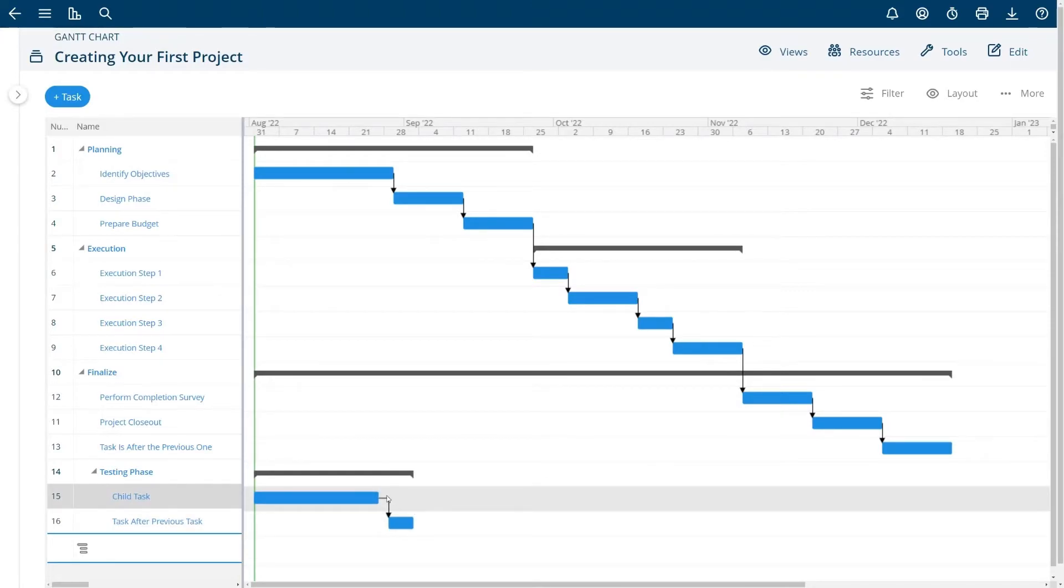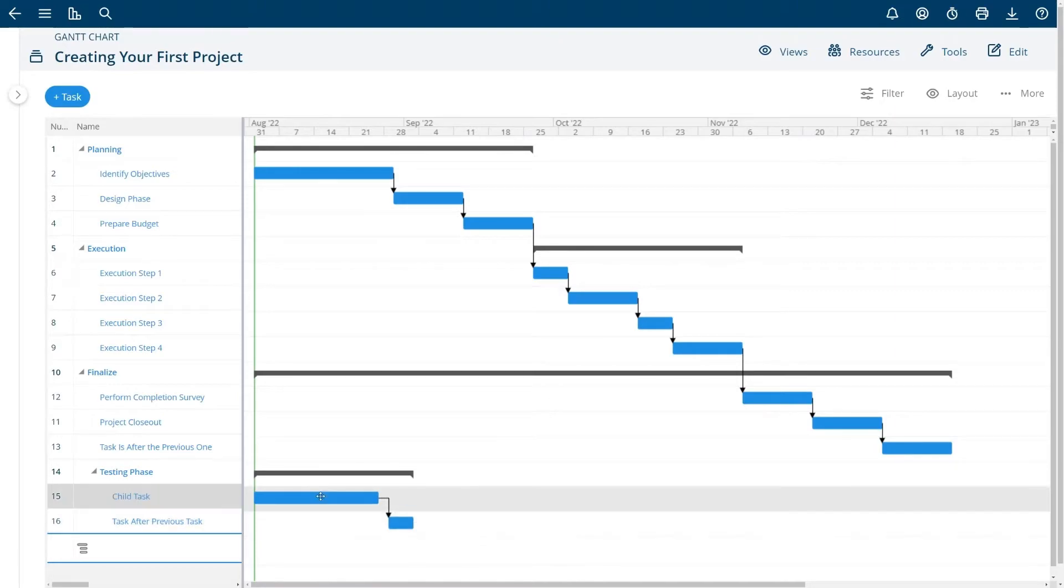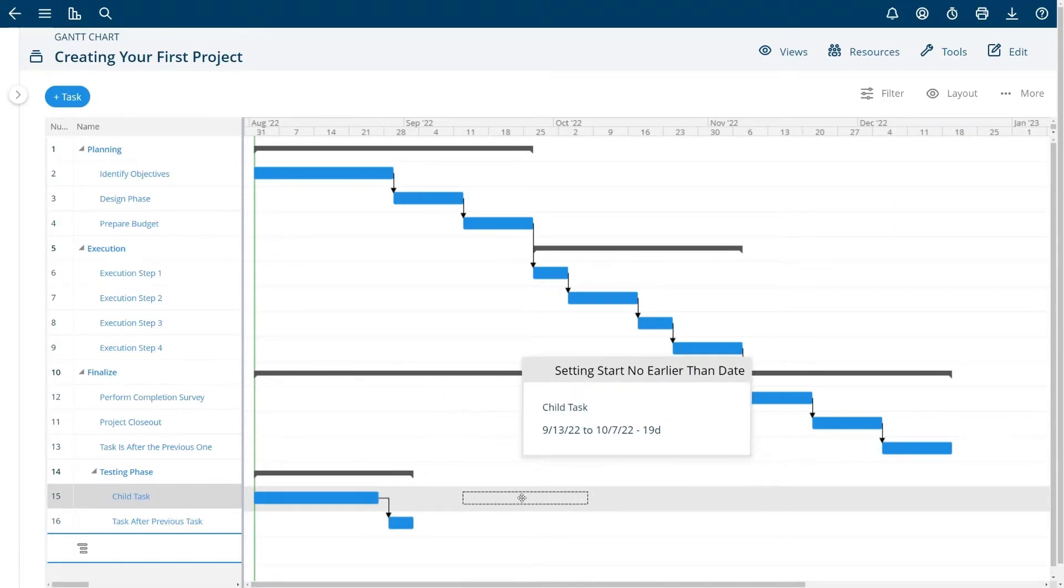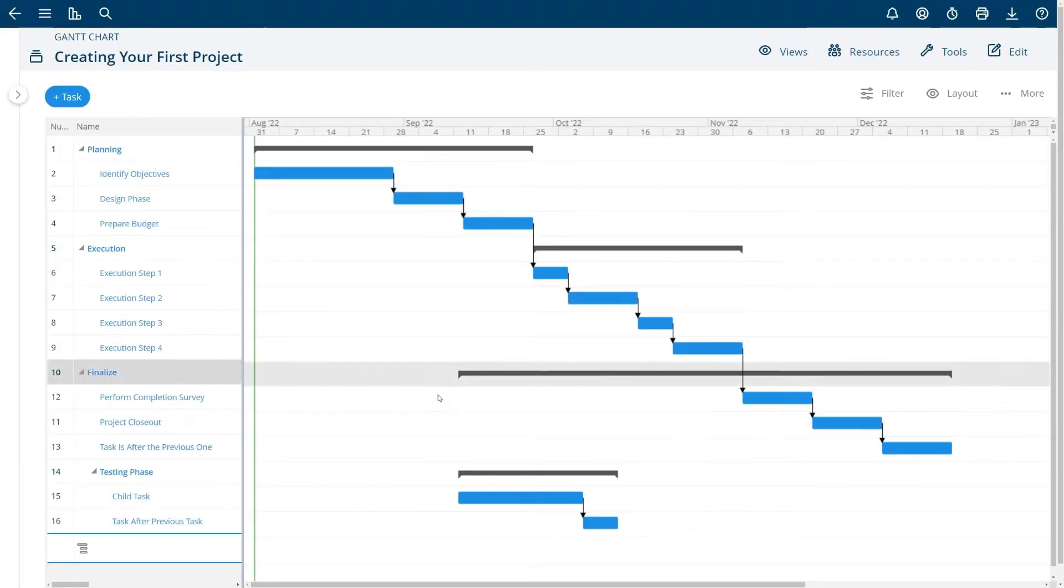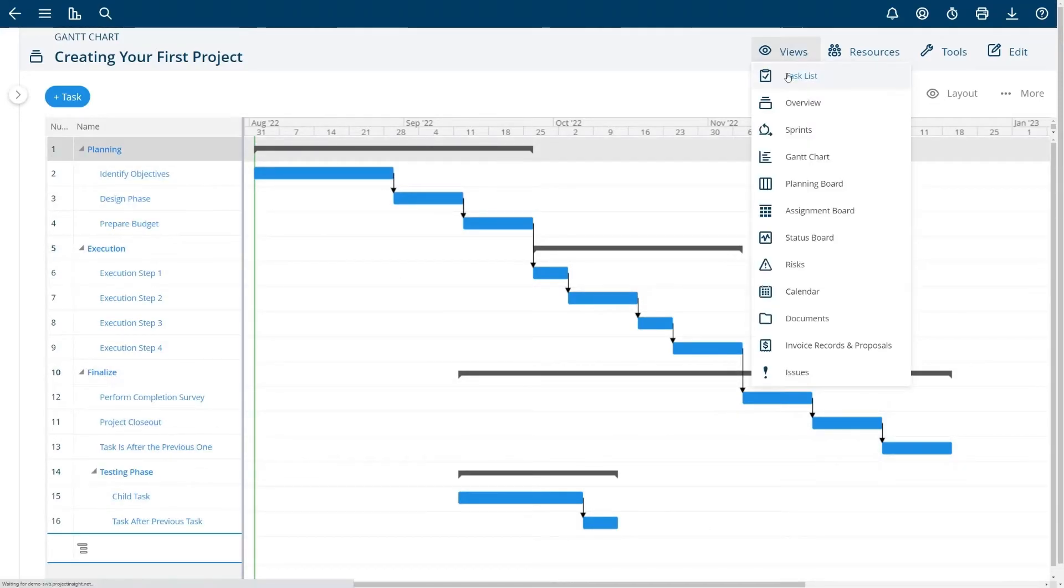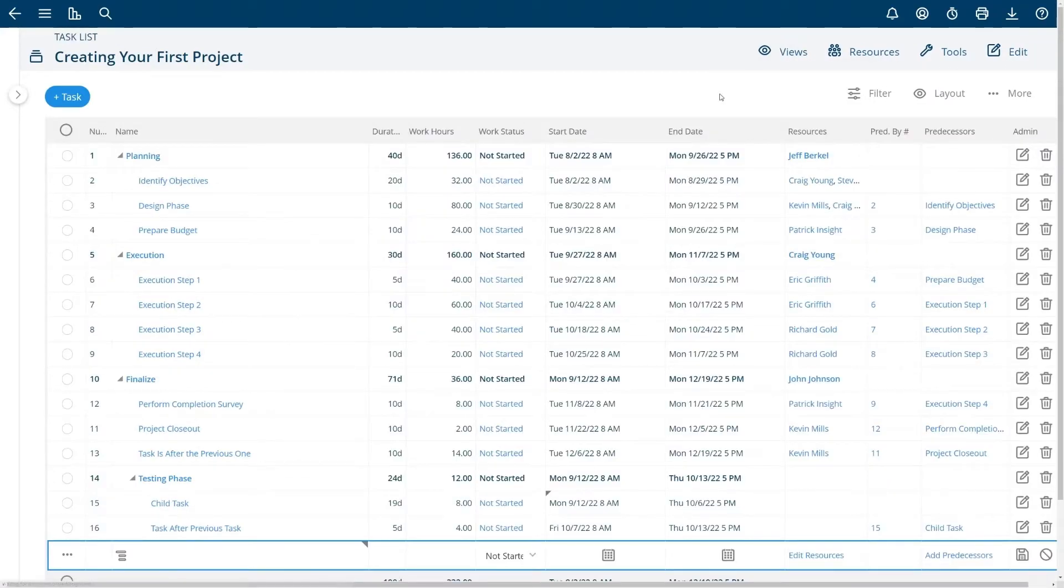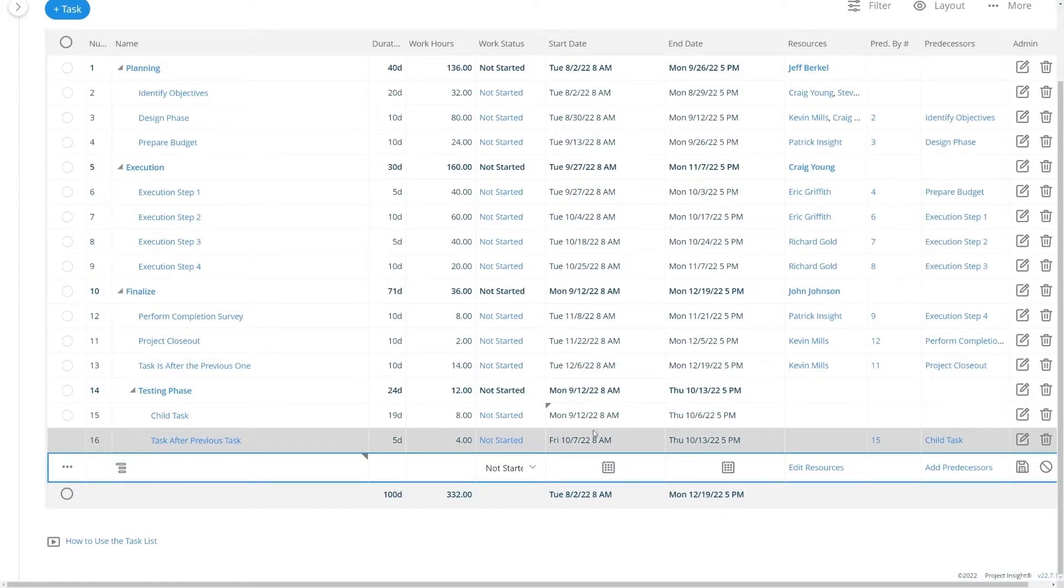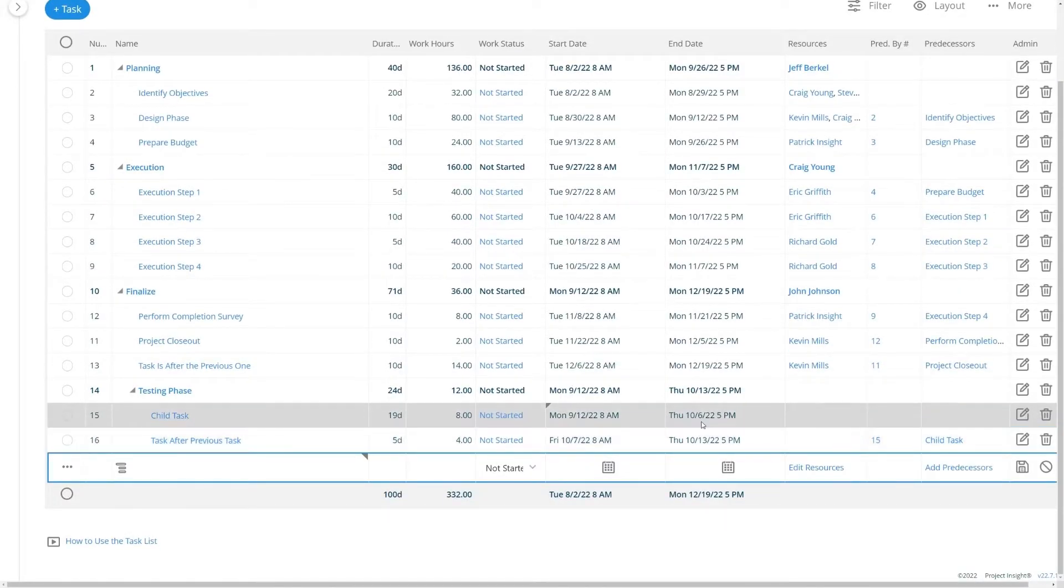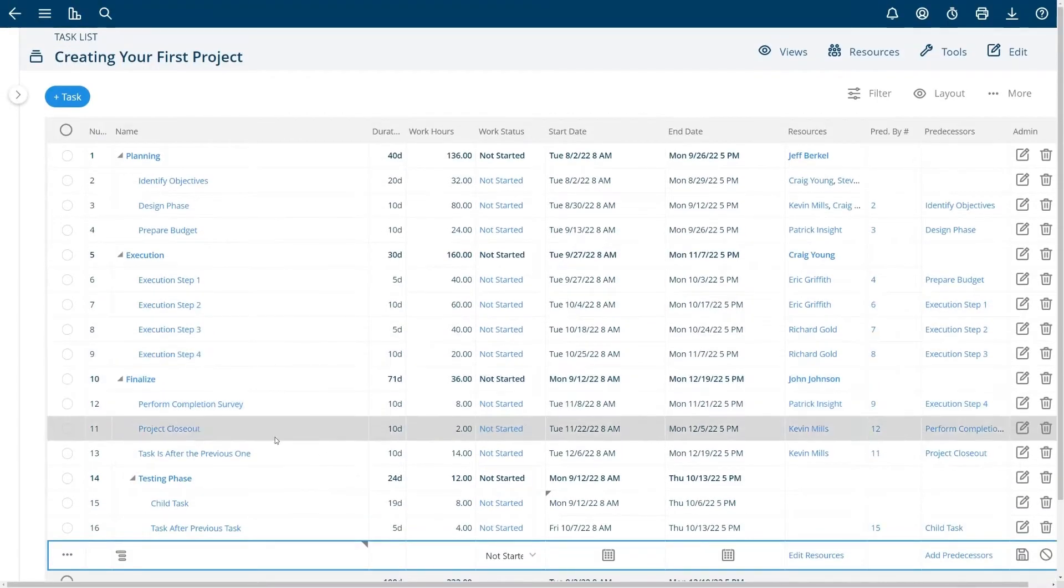The other task automatically shifts over and its dates are calculated and changed. If I move this task all the way over to here the whole thing shifts. That's what's good about intelligent scheduling. If I navigate back to the task list you'll see the dates have all changed because I manipulated them on the Gantt chart.